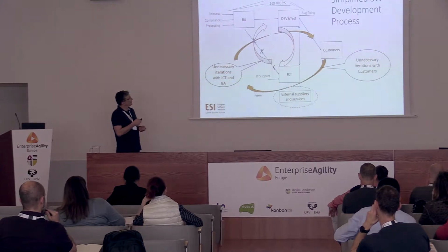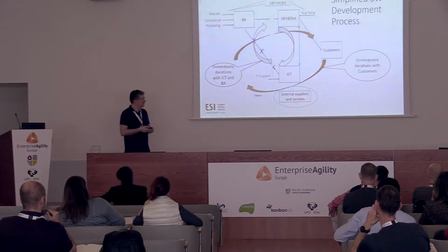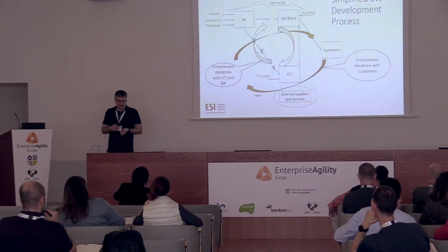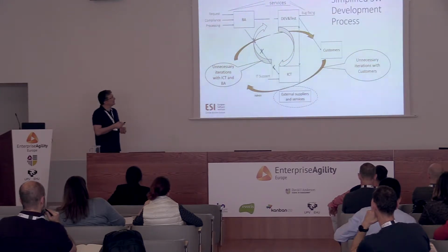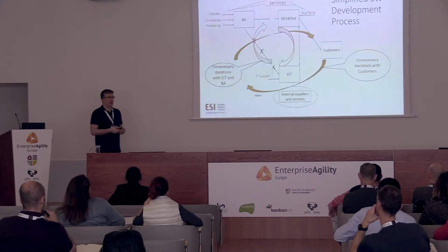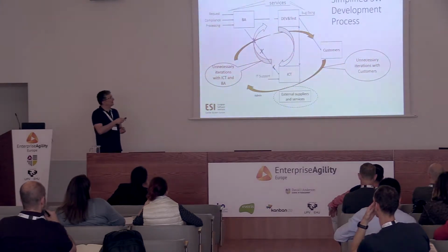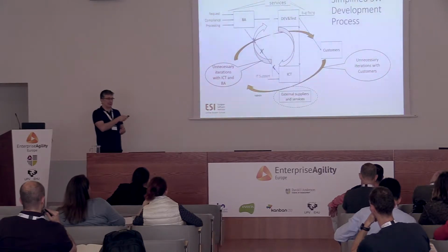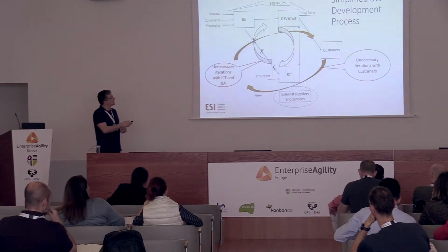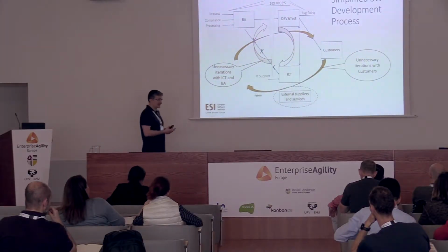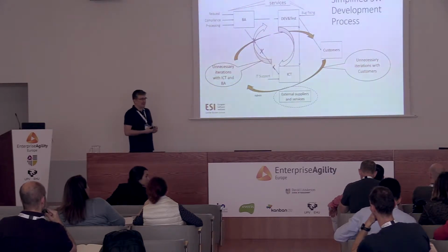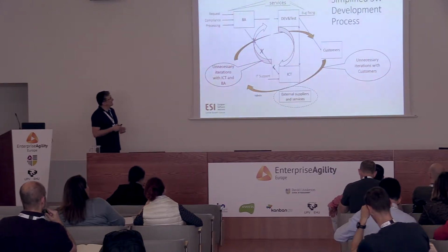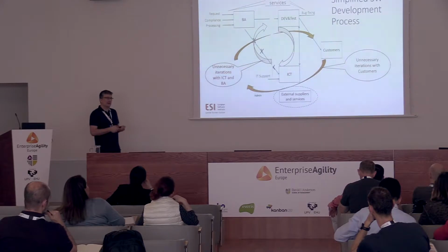Unfortunately, there was in the process this link between the business analysis and ICT, but it did not work. What happened there was that when the solution is done, or development is done, it should be deployed, and then they understand that some additional requirements come from the deployment, or some errors come. So you have these internal iterations that create stress in both teams, and at the end they delay the solution.